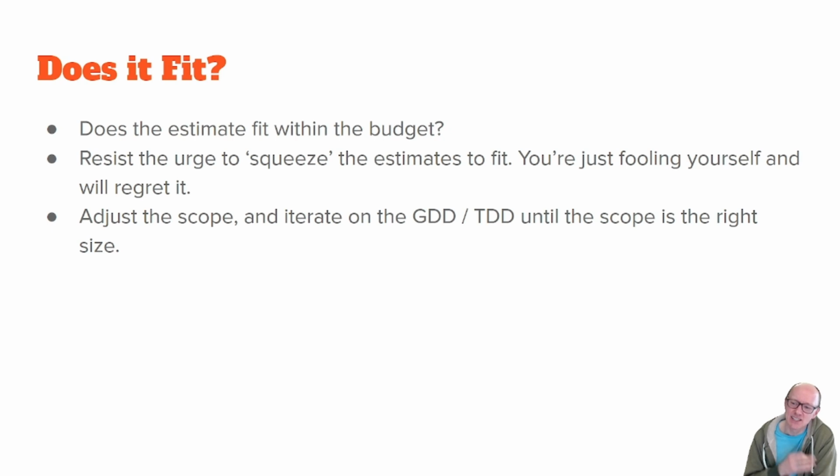That said, it is worth having conversations with the leads. Estimates are rough, they're fuzzy, and maybe the person estimating was being too cautious. They ended up accidentally double padding their estimates, because we've got padding on each task and then plus 20% on everything.